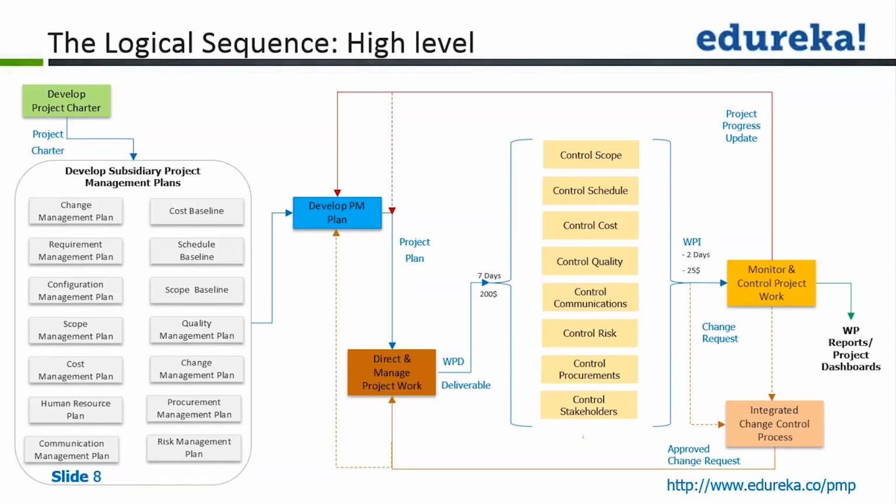And there is a question here from Pritham: when the change is approved, what are the main changes in the project plan? Pritham, that is highly subjective. It all depends on what kind of change you are looking for. Sometimes the change may come from the customer. You are working on the project and the customer has asked to make some changes to the scope. Their business requirements or business objective might have changed. They will ask you to change certain things. So that change will not be a result of any deviation here, but is coming directly from the customer, and they are ready to bear the cost of it.